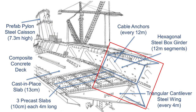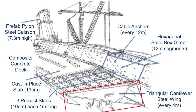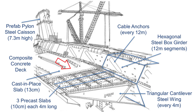The long hexagonal steel box girder was prefabricated in 12-meter segments and then transported to the site to be assembled. Triangular cantilevered steel wings were then welded perpendicular to the steel box girder, spaced 4 meters apart. Each pair of adjacent steel wings supported a precast one-way concrete slab, which served as formwork for a cast-in-place slab on top. Shear connectors ensured composite action between the slabs.